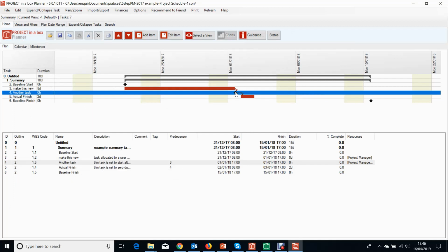So a milestone is just a normal task, but has a 0 duration, and it's indicating something about where we are within our planning environment. So both of those are normal tasks. We set the date information for them, the percentage complete, the resource allocations, etc. All of those associated directly with that particular normal task.